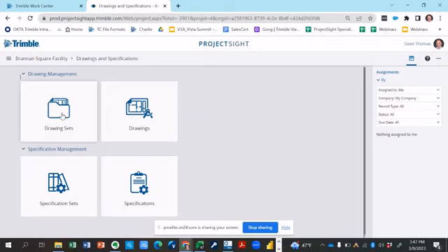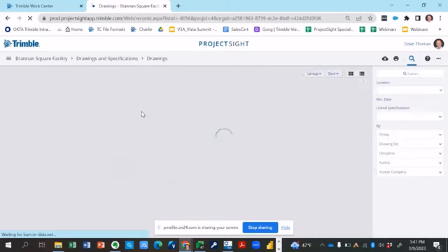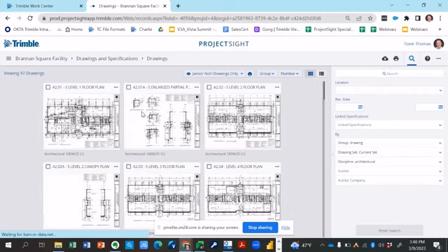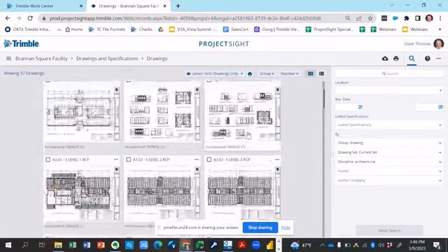All right, we got drawing sets. That's our staging area for drawing, scanning, auto hyperlinking, and then once we're ready to publish, we're publishing it into drawings, slip sheeting all the replacements, the new revisions, obsoleting, superseding the previous revisions that are getting revisioned up, so you're not having to do that one by one on your own.